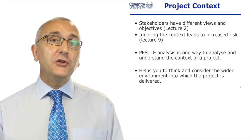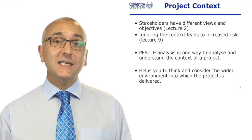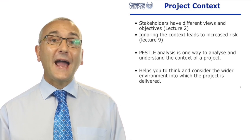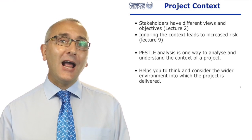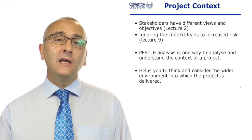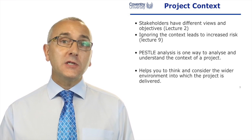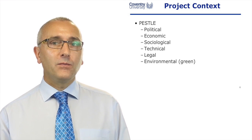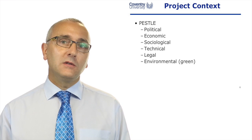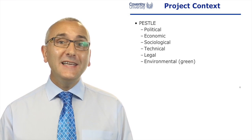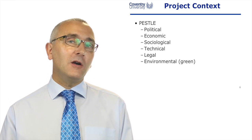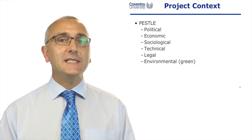One of the tools you can use to analyse and understand the context of a project is PESTLE analysis. The next slide will explain what the acronym means. This helps us consider those wider environmental issues that our project has to fit in. PESTLE stands for Political, Economic, Sociological, Technical, Legal, and Environmental — and I mean green environmental, as opposed to the environment where the project sits.